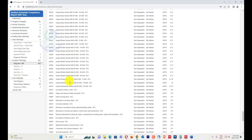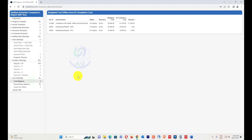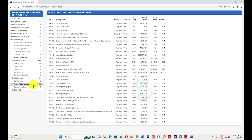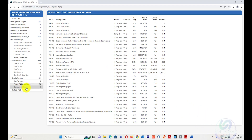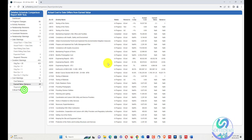Cost warnings appear if there are changes between your budget and at-completion cost. Earned value variances show which activities have how much value achieved. Regressive billing is also flagged — for example, if in the previous month progress was updated at 10% and this month it was updated at 5%, that's a regression of 5%, indicating decreased progress which has a negative impact on project management. This tool makes it very easy to catch such issues.